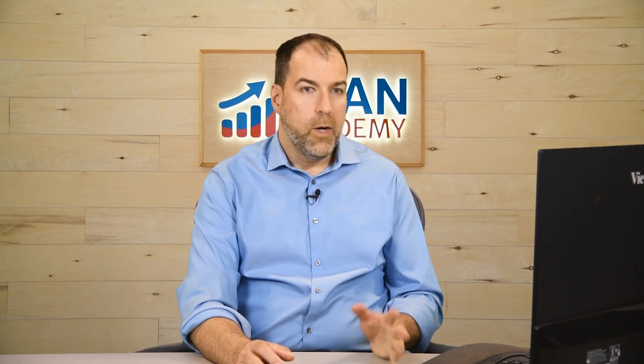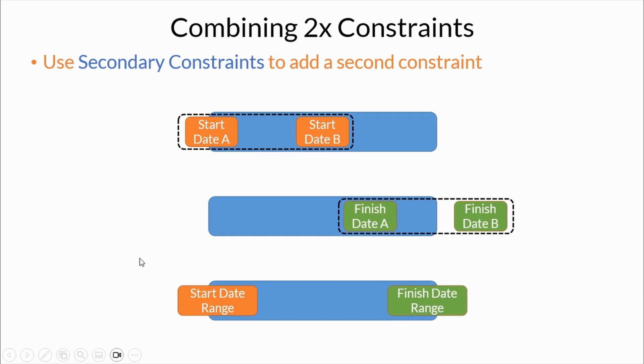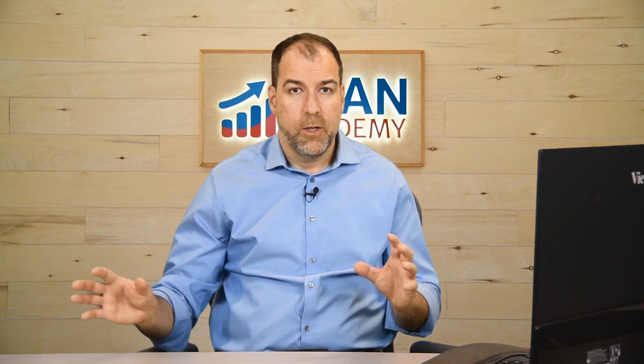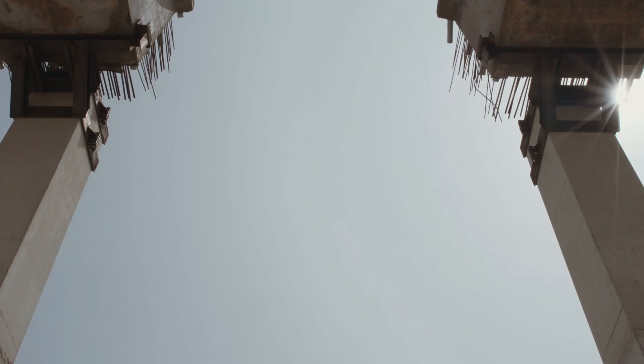So what can we glean from all of this? When we combine two constraints, the primary and the secondary in P6, we can either provide a range for start dates, a range for finish dates, or a range for both start and finish dates.